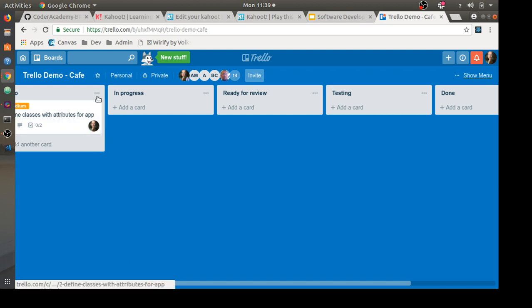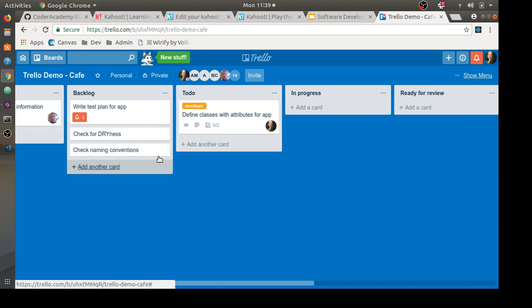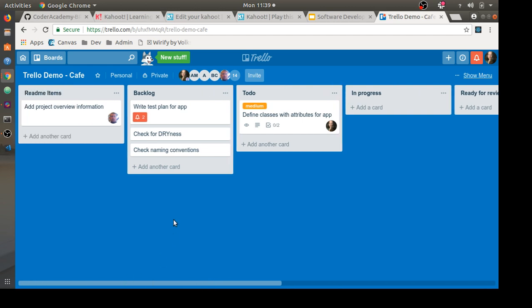So what you'll want to do when you work on your project is try to define as much as you can all the things that need to be done. Then sit together for an hour or so and try to estimate how long you think it'll take to do those things. And as you go through that estimation process, you'll realize, okay, we're not going to have time to do that. We have the whole list of things, and maybe those things stay in backlog. But then you'll decide on what are the MVP items, the minimum viable product. What is necessary for us to call this thing done?